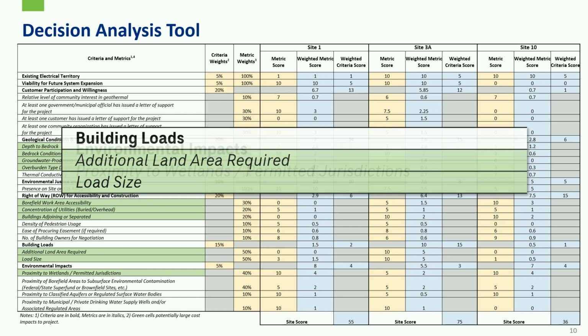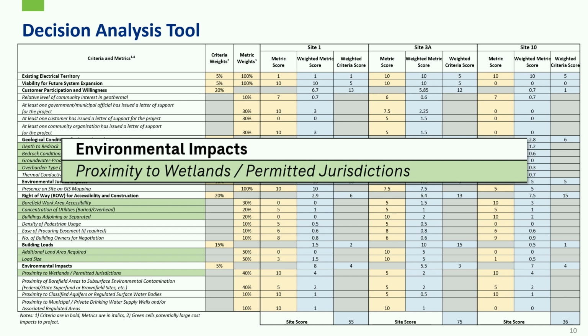Environmental impacts. So when I'm doing a feasibility study for a standalone building, 9 times out of 10, I'm going to assume that they've already done their due diligence on any environmental impacts. When we're doing this in the utility circumstance, I think it's really important that we look at proximity to wetlands. What are the different jurisdictions? We're probably not on a Superfund site. Those are sort of easy to find and eliminate, but are you on a listed site at the state level? Has there been any remediation there?